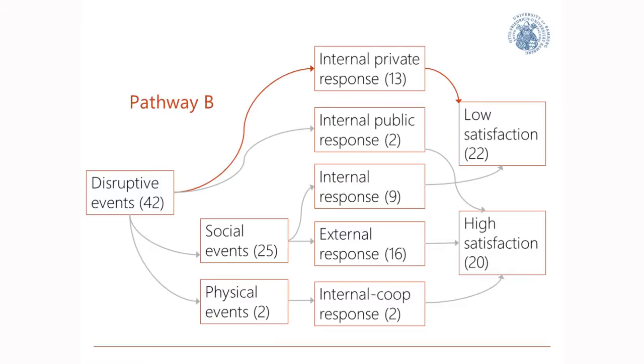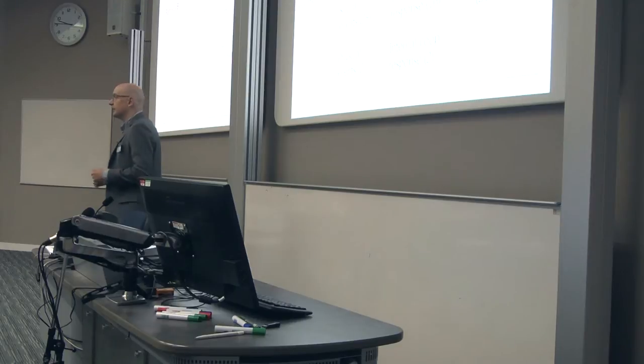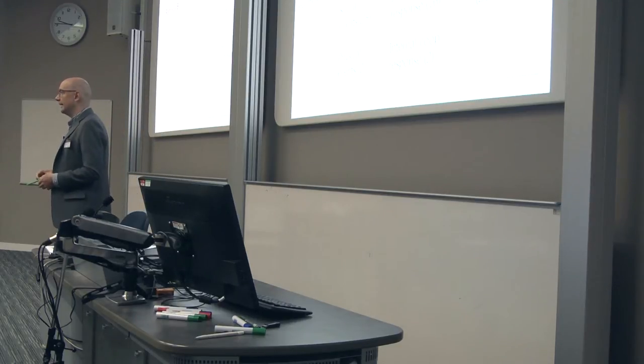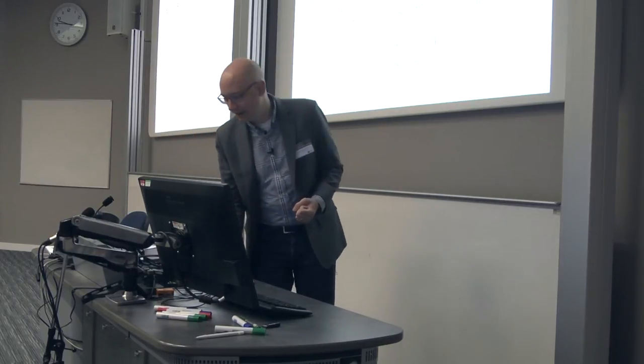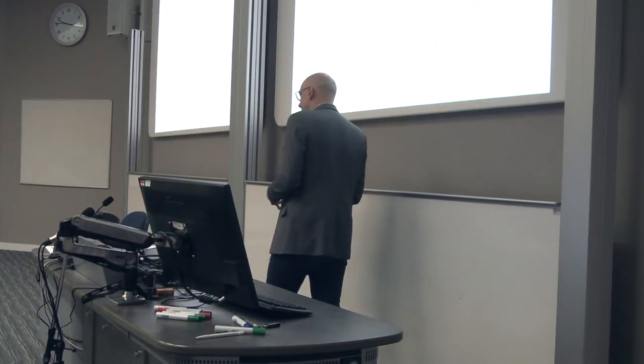Pathway B shows what happens a lot in public-private partnerships: independent of the nature of the event, if the private actor responds with an internal response, it doesn't lead to any satisfaction at all. For example, in a public-private partnership in Rotterdam, the contractor had to come up with a technical solution, the municipality disagreed and sent them back, the contractor made a new solution, still no agreement — and that kept lingering on. What happens in PPPs is that the public agency believes that because they've paid a lot for the contract, they can sit back and do nothing. We can show that really doesn't work.